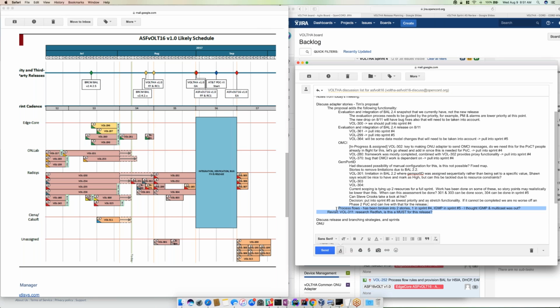So what we do have time for is to finish all the stories that will be in the next 2 sprints, and then based on that, figure out what needs to be done from a release standpoint and use the latter half of tomorrow for both of these, maybe folding the ONU discussion in as part of the integration testing. Does that work?